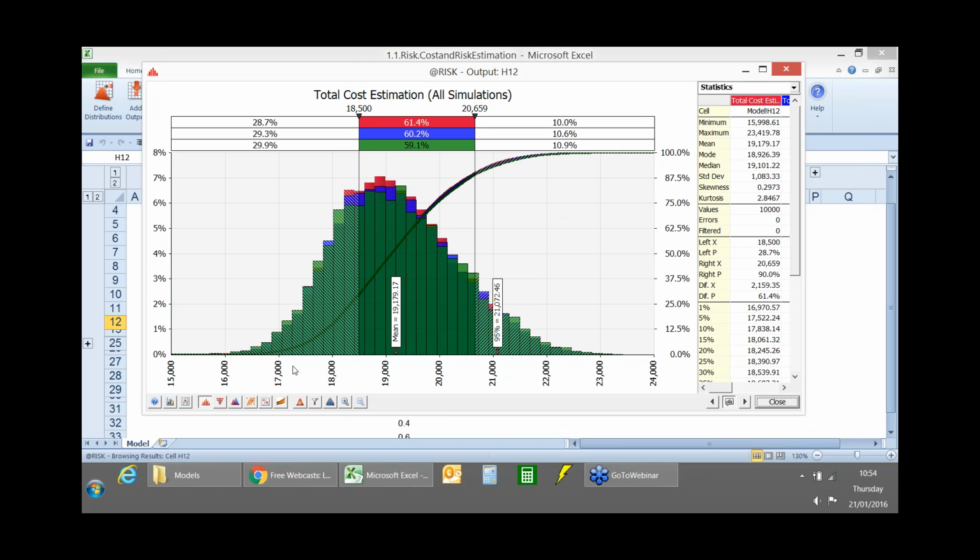So how much difference is that correlation coefficient making to my model? Well, in this particular case, the answer is virtually none from a practical perspective. Of course, you might get hung up on this 1% difference, but believe me, 1% difference is very, very negligible when you're talking about probabilistic modeling. And so what we're seeing is that there's a slightly higher chance that we're going to finish under budget if that correlation is 0.6, and a slightly higher chance still if it's 0.8. But really, it's not that much. As I said to you, what you tend to see is more impact around the tails, and you'll see that these tails have increased slightly, and this tail has increased slightly as well. But for that particular input, there's very, very little difference.